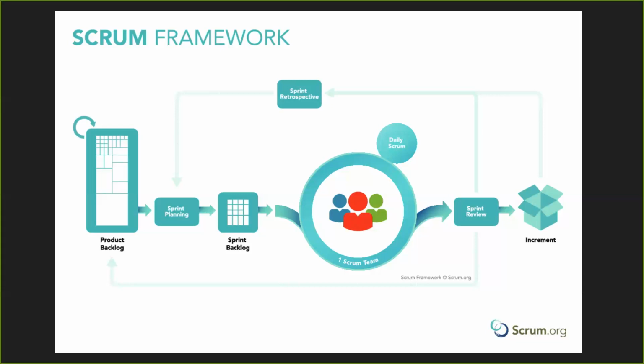You create all these user stories, as they're called, and then with the team of developers or by yourself, you rate how hard each thing is going to be. They're numbers from 1 to like 100, and they're not necessarily in terms of the number of hours it will take to implement, but more how difficult a task is, how much thought and requirements it needs. A 1 is low-hanging fruit.